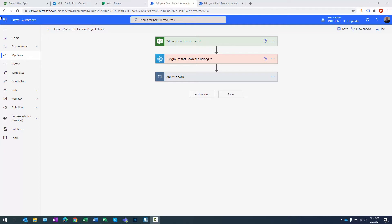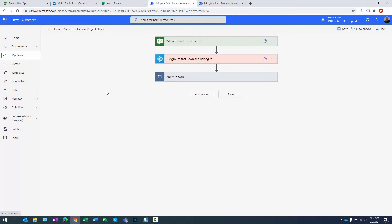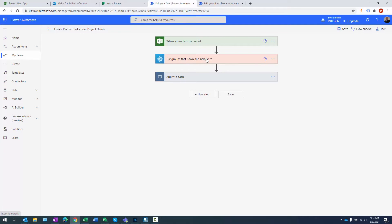So we're looking at the flow right now, and you can see the trigger event is when a new task is created, and you just go ahead and put your URL in there. The second step in this process is an action to actually list the groups that I belong to. So as these projects are created, a group will be created. If you create a team or you create a project in Planner, an Office 365 Group is going to be created with the same name as the project.